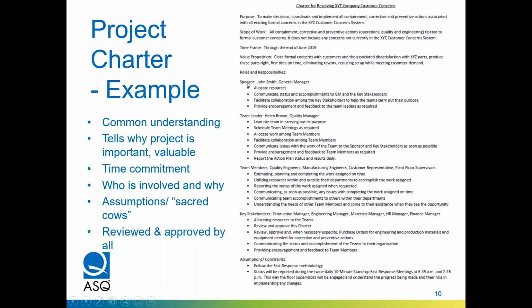Within the roles and responsibilities, for instance, a sponsor is responsible for allocating resources, communicating status to the key stakeholders. And the key stakeholders are the people that are like peers of the sponsor, that without their help, resources, this project can't get done. The sponsor is the person that has the fire in the belly, I like to say, that really has the most to gain or lose by the achievements this project will contain.